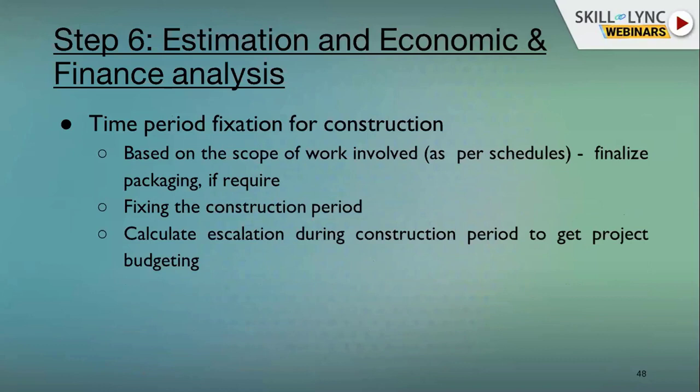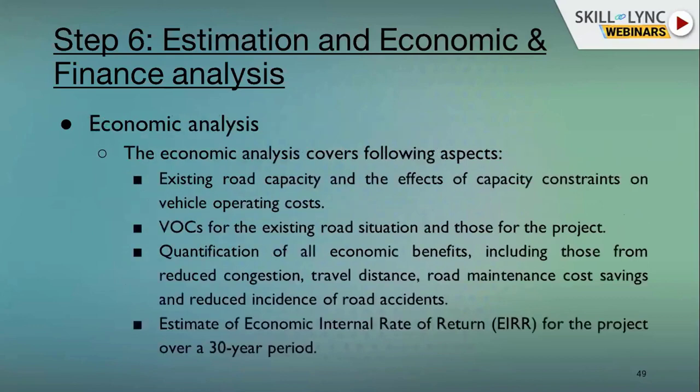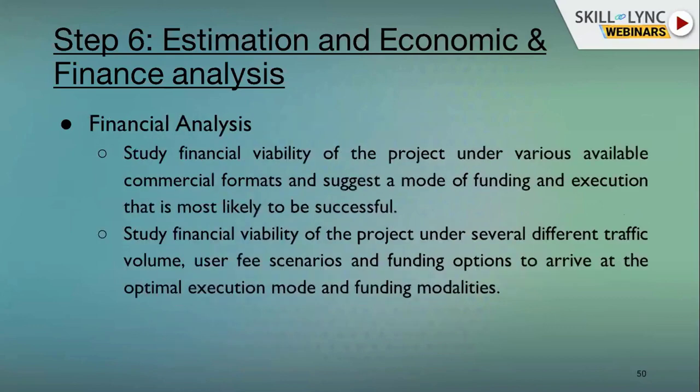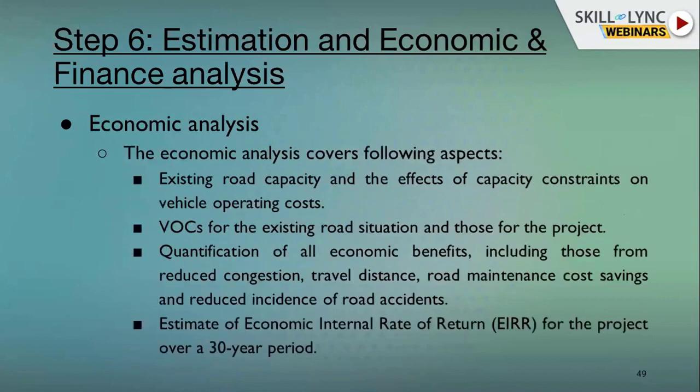Finally, based on the cost, we need to finalize the package, the construction period, and how much escalation we get during the construction period. For that, we need to discuss with the client, finalize the package size and fix the construction period. Next step is economic analysis and financial analysis. These two I will not discuss much here because this is mainly the job at the feasibility stage.